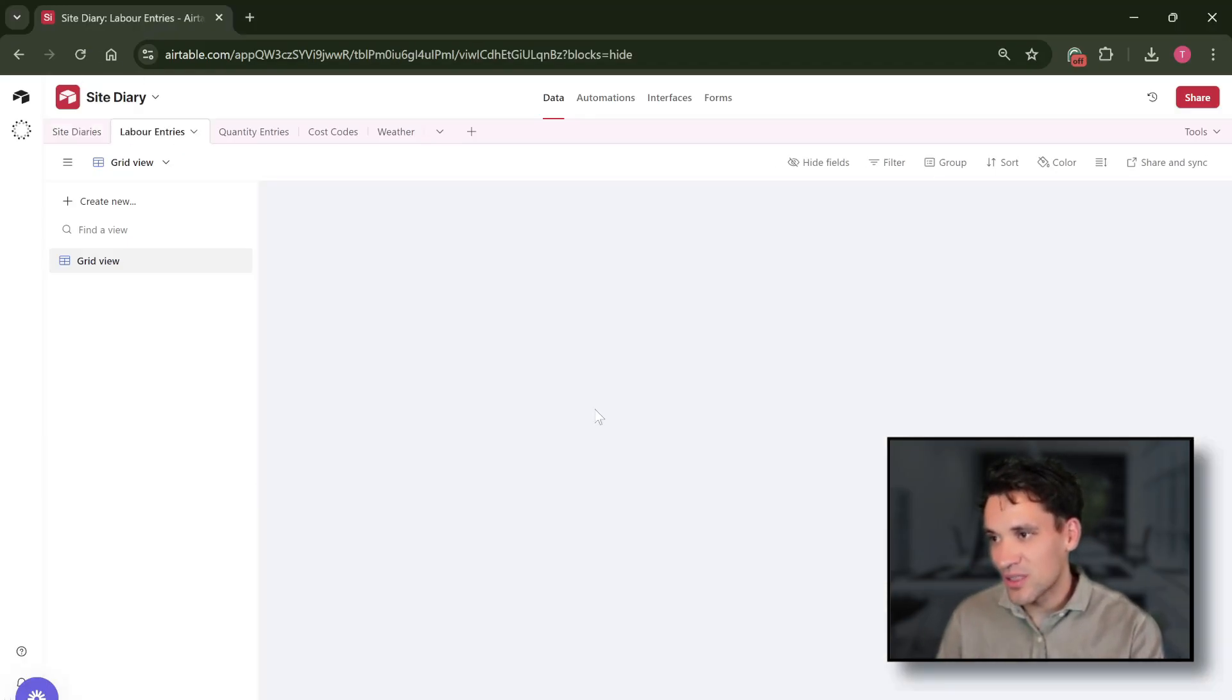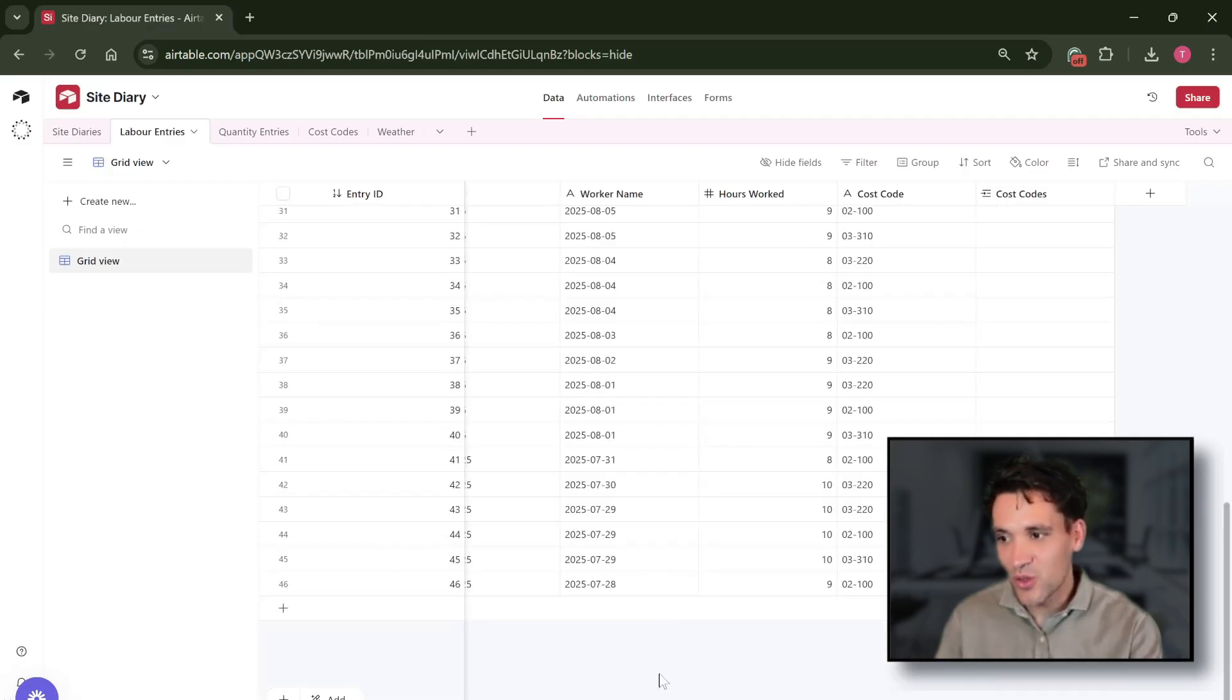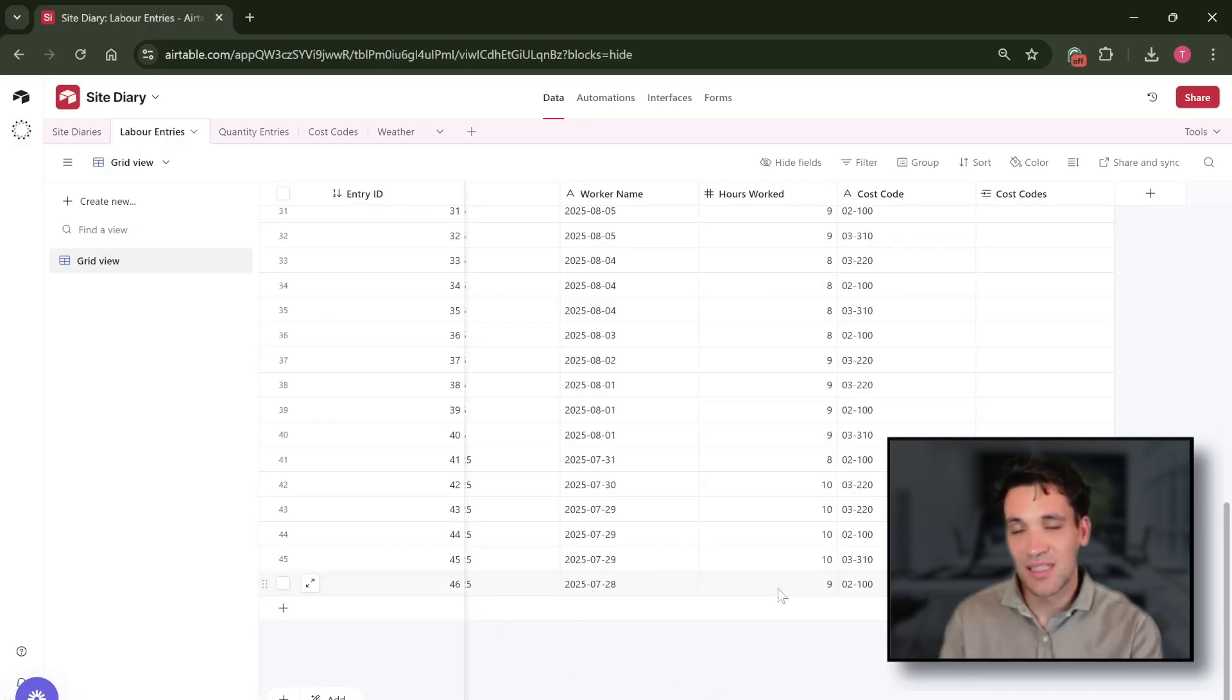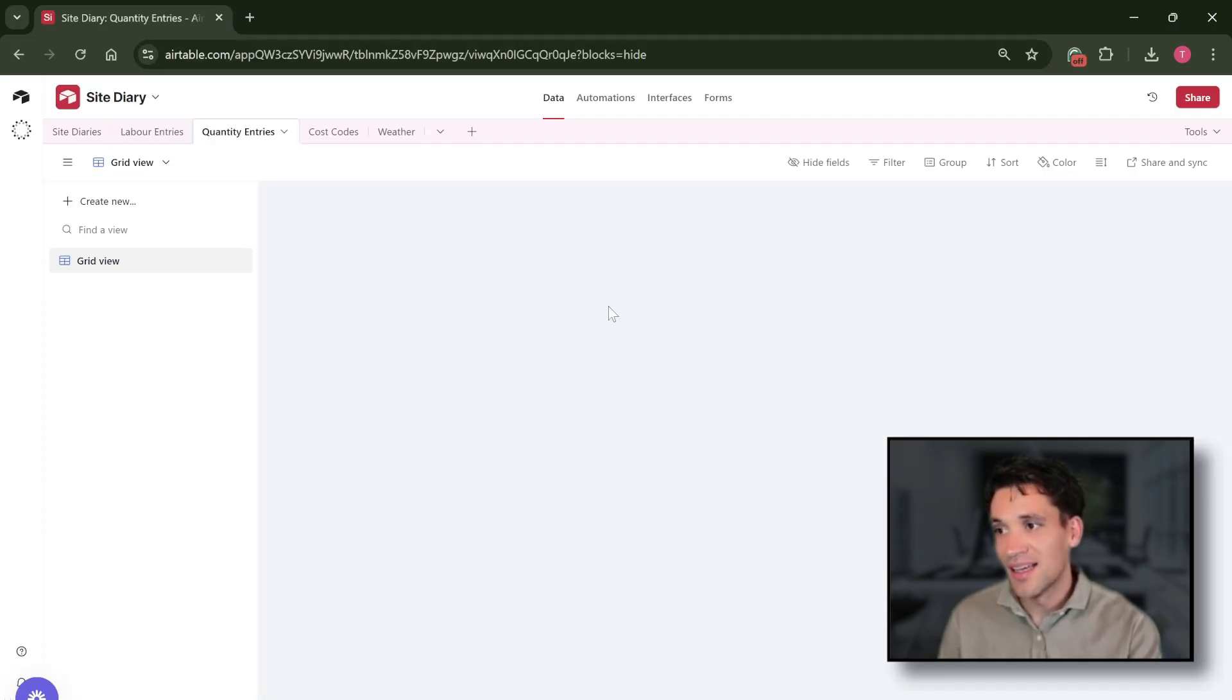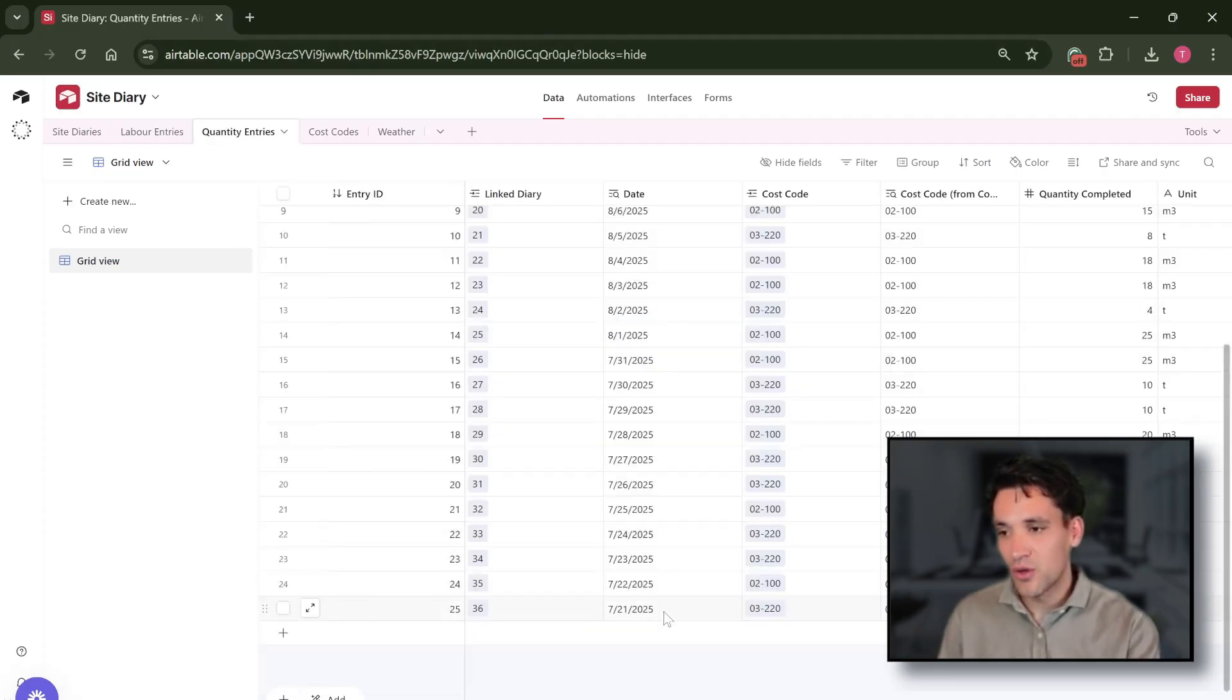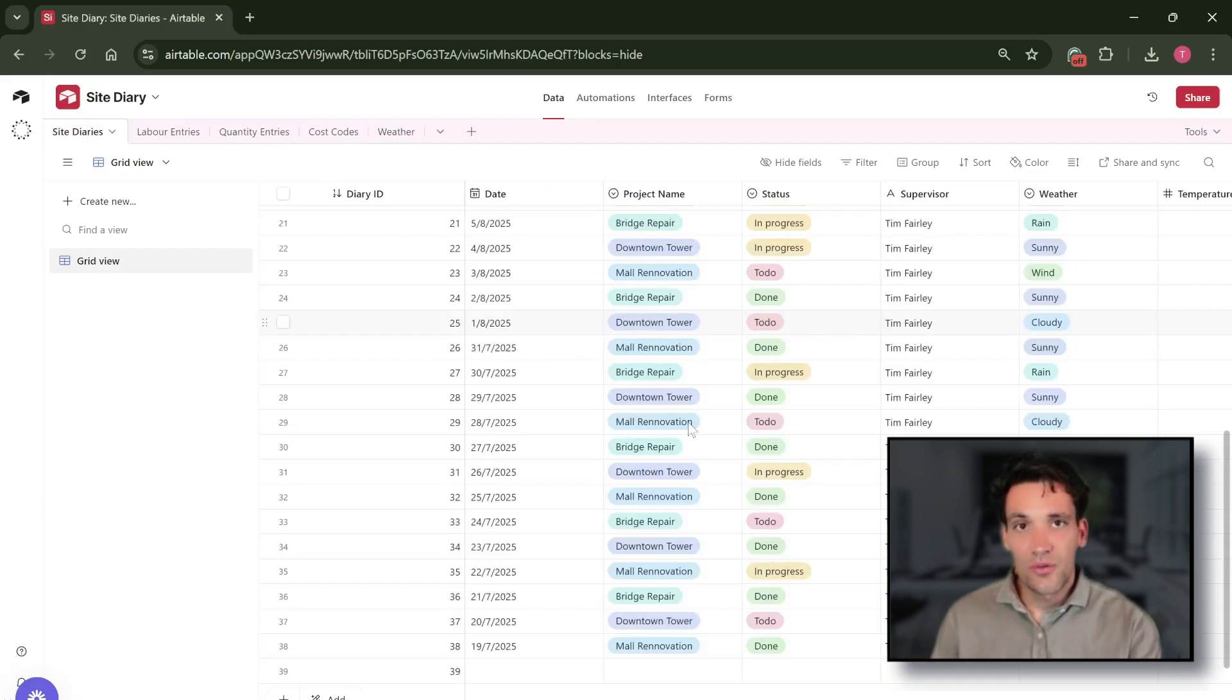In our labor entries, each record in our labor entry table is a worker's hours on a specific day against the cost code. Same with the quantities, each record in our quantity table is the quantity of work completed against the cost code on a specific day.